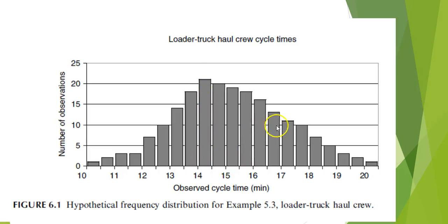And again, trying to find an even one, about 17.5 minutes is this frequency, and you would have measured that 10 different times. They wouldn't have all come together. You would have seen one that was 10 minutes, and then maybe one that was 19 minutes, another one that was 14 minutes, and maybe another one that was 15, and then another 14. And as you counted over the day, you would end up with this kind of distribution.